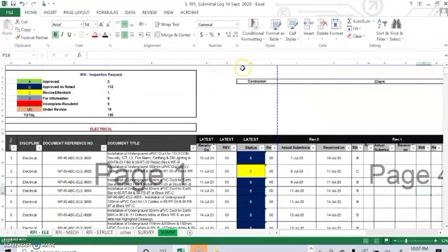We only have to focus on this status. So we have a submission from revision 0, the first submission that we had, which has an actual submission on July 7 and received on July 10, and then the status is B. To have the latest status, we have to resubmit again and place it in revision 1, and the actual submission is supposed to be, for example, 2nd of April 21.